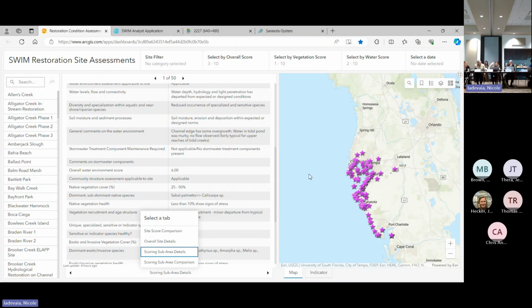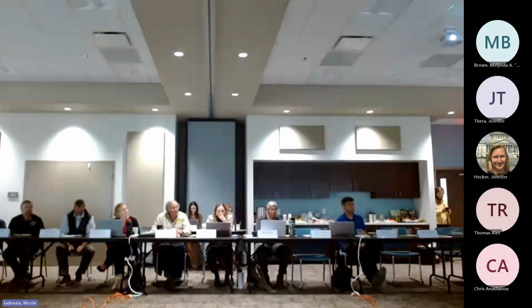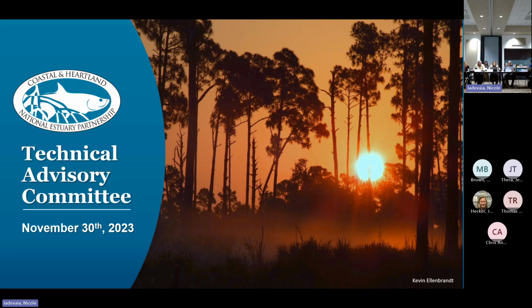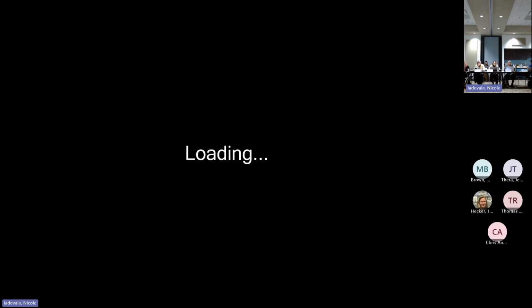Just a parallel in our reclamation and restoration projects, we obviously end up with conservation easements over the completed restoration, and the Corps and DEP have recently included in our long-term management plan that we do 5-year updates from the baseline on that conservation easement. That's a way to trigger action if you have hurricane tree fall and now you have invasive exotics from that vector point, or if we did an enhancement planting and there was flooding, things like that.